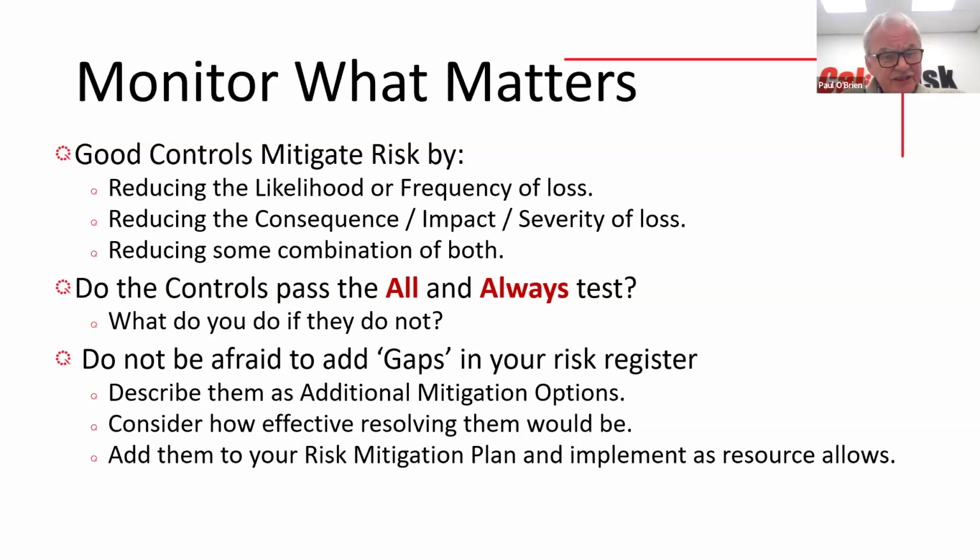So there are other things then that will reduce the consequence, like the sprinkler system. Same building, put a sprinkler system into it, reduces the consequence because there's less damage. So there's before and after, but there's also ones that will impact both.